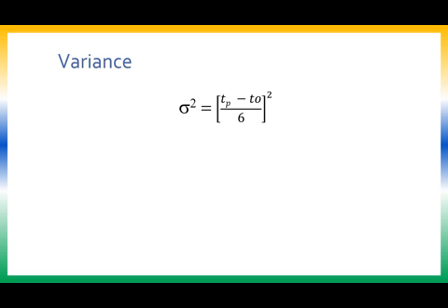You will have to calculate a variance. See, whenever we are considering probabilistic estimates, the possibility of variance will always be there. See, I will calculate a particular estimate or the project duration to be, let me say, 30 days. So it will not be exactly 30 days. It will be 30 days plus or minus some value, plus or minus maybe 2 days. So I might finish within 28 days or I might finish it by 32 days. So that variance also has to be computed.